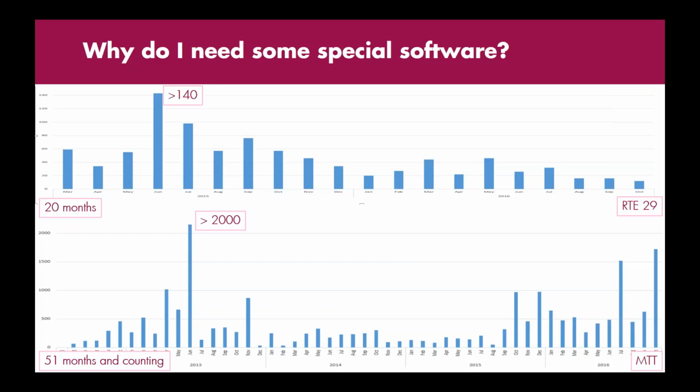You cannot just go and say, send this to everybody in the team and we'll see what happens. That's going to be pretty much a nightmare for everybody. So what people do, they establish a RACI matrix: who's responsible, who's accountable, who can contribute, who needs to get information. So what type of information needs to go where. That matrix needs to be implemented. That's something that we can import in our system, and that establishes how you distribute information.